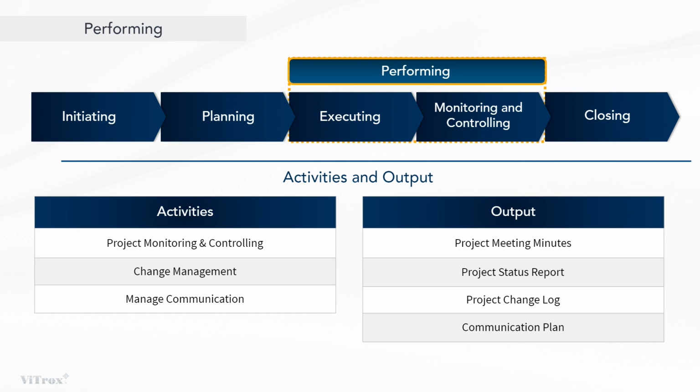During project execution, changes can sometimes arise unexpectedly. Here is where change management is in place. Change management involves assessing and handling changes that may arise during project execution. The project change log serves as a record of all changes made during the project. This log includes change requests, approvals, rejections, and their impacts on scope, schedule, and budget. The change log ensures that all changes are properly evaluated and implemented.